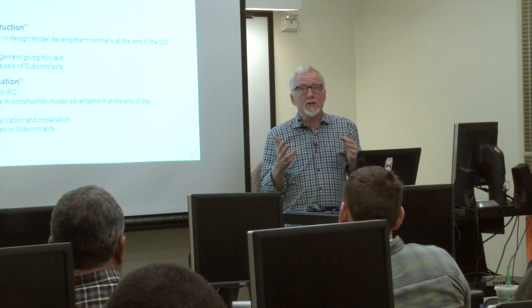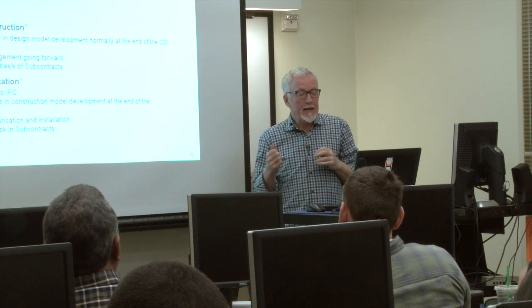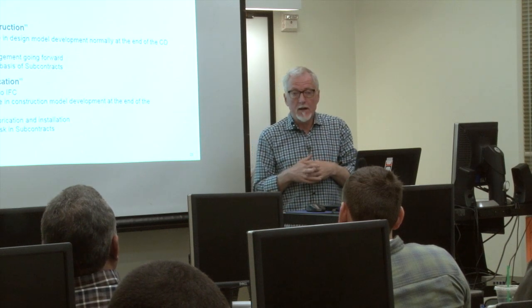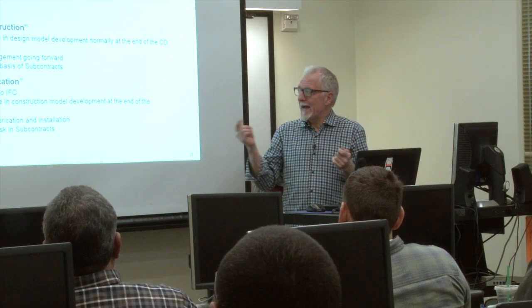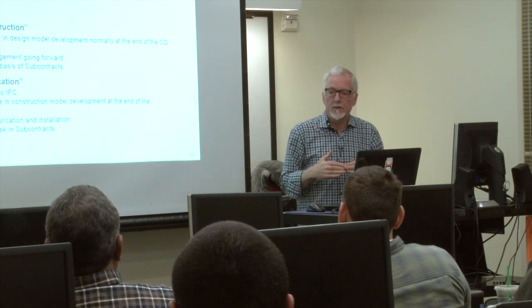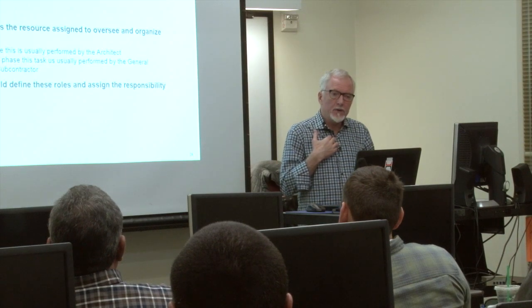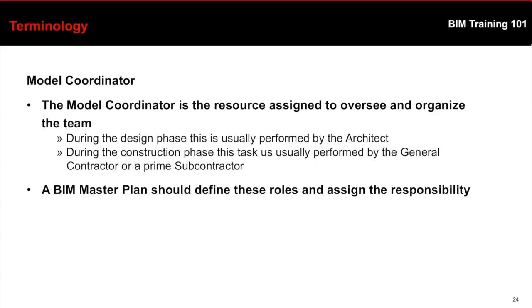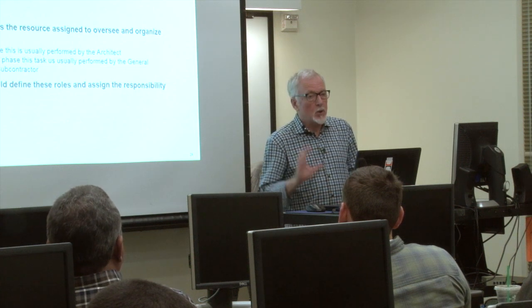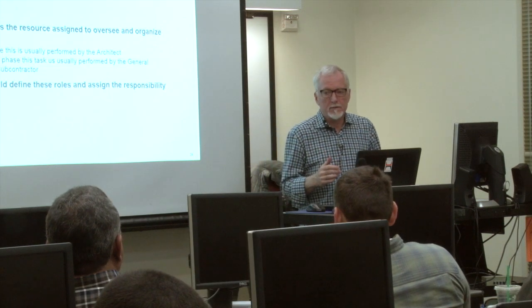So we, meaning the construction team, are going to figure out every little bit about any building, down to the clips and the hangers and everything. Anything that takes up physical space, we'll put in our models. And I'll show you some examples of that. So we have to go in and perfect our models, and what that IFF means is that it's effectively perfected. It is our plan of how we're going to build, no differently than an approved shop drawing would be on that side. And then there's kind of a new role in our industry, model coordinator. They didn't really exist before, and now it's a real specialty. At Hoffman, there are 12 of us, including myself, so myself and 11 others, that work in our department, coordinating these models and working with our subs, our architects, and our owners to get all these models really, really well perfected.